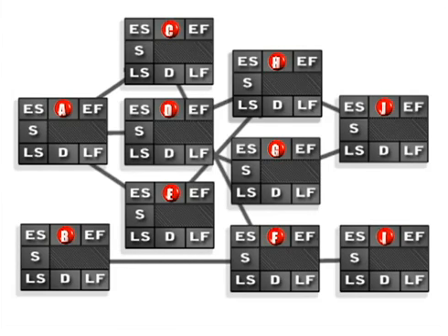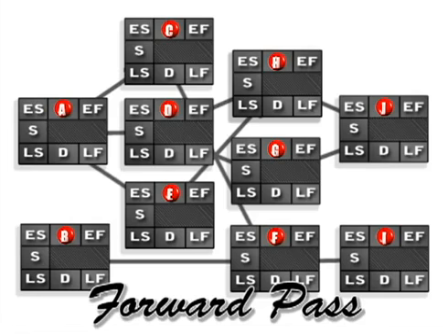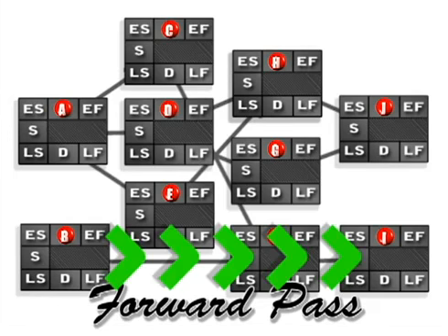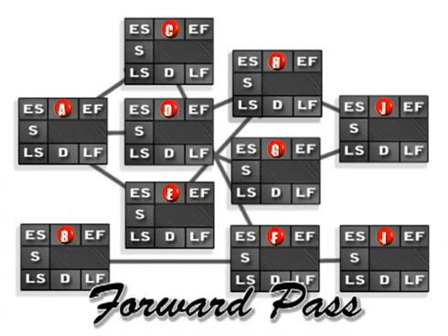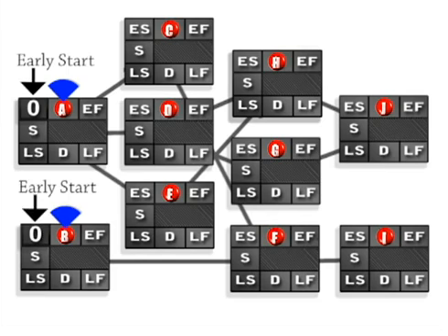The first thing that we're going to do is a backwards pass. Excuse me, we're going to do a forward pass. That means that we're going to move from left to right. In case y'all don't remember, when you were in class, I told you I was dyslexic. Remember that. All right. So we're going to start with activity A. A starting activity begins at time 0. So our early start for activity A is going to be 0. The same thing for activity B, because activity B had no predecessors.